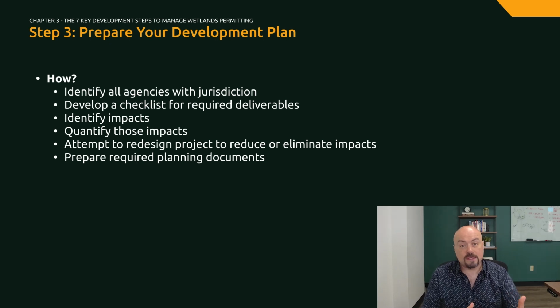Once impact areas are identified, you can more easily work with your team to come up with solutions for avoiding or minimizing those impacts to reduce your permit requirements. In some situations, you may be able to request variances to standard permit rules by proposing management plans that eliminate the impacts.